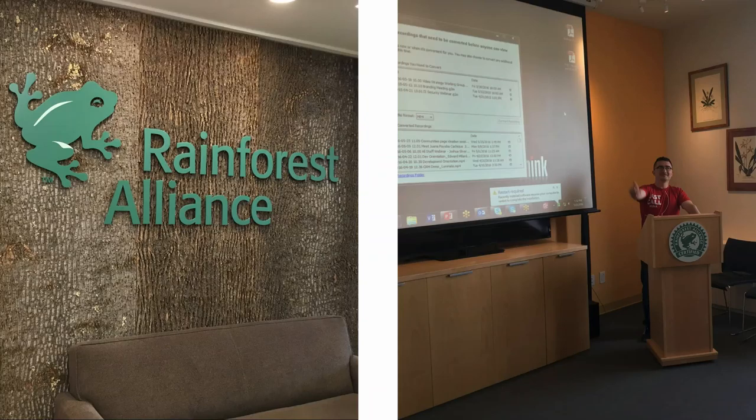And then we would find out, well, we know we talked about this thing, but it doesn't need to do all that stuff. So it's just like, okay. So we would kind of refine what it meant. And we went through everything and got further alignment on basically the size of each backlog item.